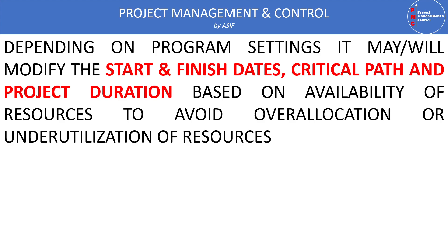When performing resource leveling, it may impact the start and finish dates not only for the project but for individual activities. It may also impact the critical path because of the unavailability of required resources at the required time, and thus there are chances the project duration may increase.